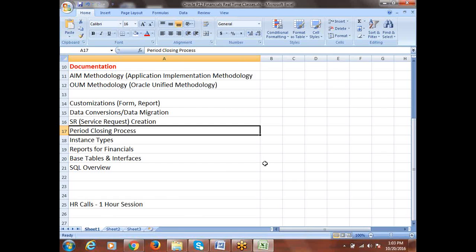So that is the reason that in normal implementations, there will be a mutual agreement. A consulting company and a client will have some agreement saying that, okay, implementation for 10 months or 1 year. After implementation, you should support for 2 months or 3 months. That we call post implementation support. Post implementation means after implementation, the support we are doing. We will discuss it in detail anyway, but I'm telling you a simple point. Generally some companies give post implementation support for 2 or 3 months. Why do we have to give it? Because we have to be there till the system is stabilized, in the sense that it's running properly.